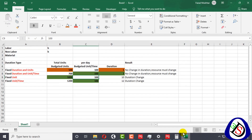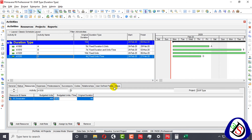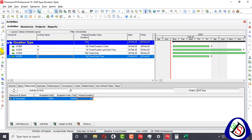The last type is Fixed Units Part Time. When you have a fixed units per time and you don't know your duration or budgeted units, you use this duration type. I will add an excavator and put units per time — say 10 excavators working 100 hours a day. In this case, if I know my duration is 5 days I can calculate budgeted units. If I know budgeted units are 1000, I can calculate the original duration.